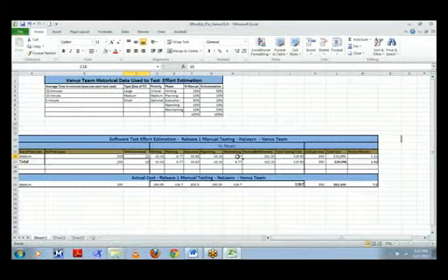Since we also tested this application on 4 different browsers, the browser factor is 152 hours. Altogether we estimated about 220 hours. The cost per hour is $50, so we approximately estimated about $11,000, and about 1.5 person-months. We did this estimate just before starting the testing activities.